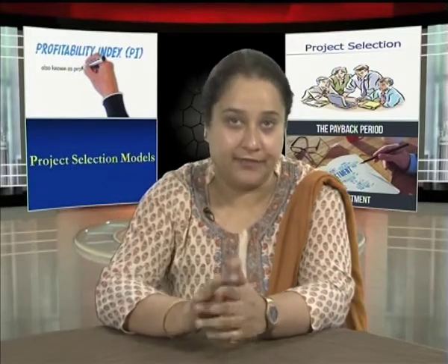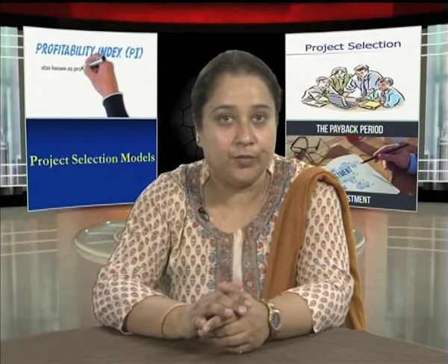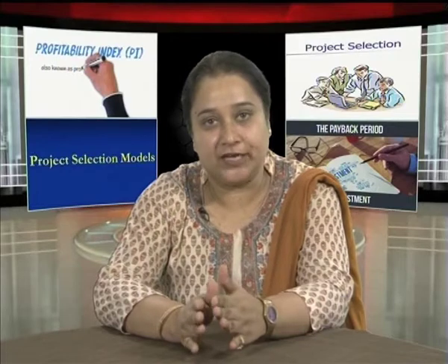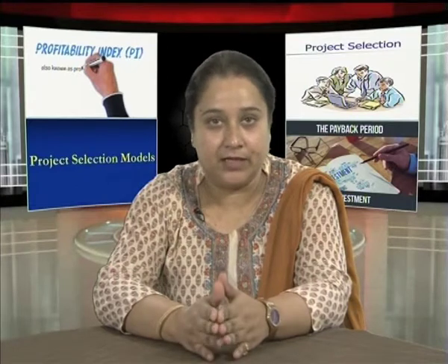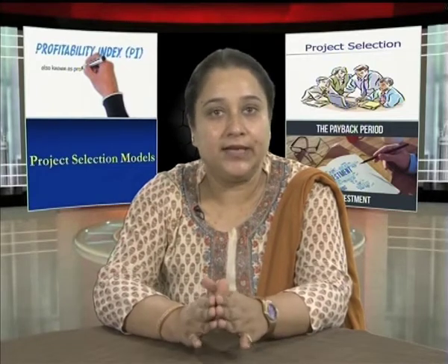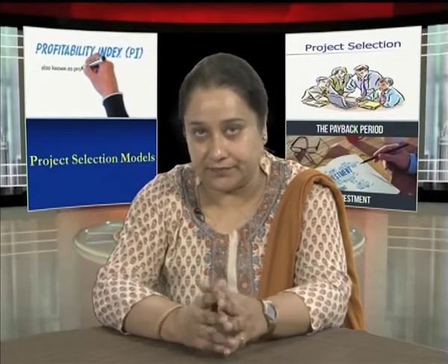Early in the life cycle of the project, net cash flow is likely to be negative, the major outflow being the initial investment in the project. If the project is successful, cash flow will become positive. The project is acceptable if the sum of the net present values of all estimated cash flows over the life of the project is positive.